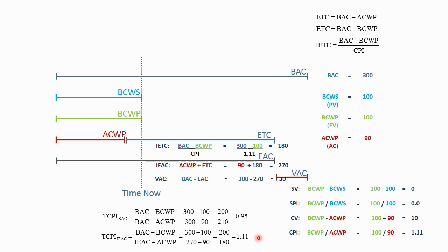So in some cases, you could replan the project. And you could say, okay, I'm going to reduce the budget so that the CPI is now 1.0. That changing these is a pretty significant thing to do. It's better to keep the plan baseline, so you always have something to compare against. You always know what your original estimate was, and just track the progress on the project going forward at a CPI of 1.11. So here, to meet this budget, we're going to expect 1.11. And now, if the cost performance index falls below 1.11, that would be an overrun to this new estimate of completion, or the CTC. If the performance falls below 1.11, it means we won't get this 30 hours of underrun.